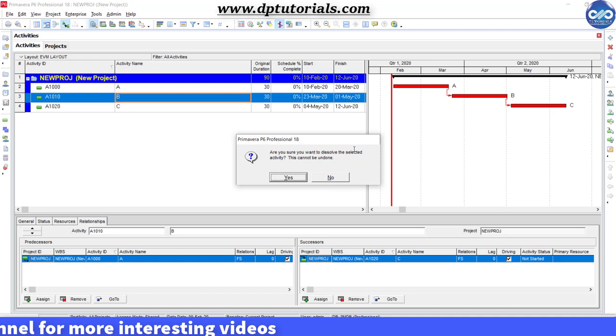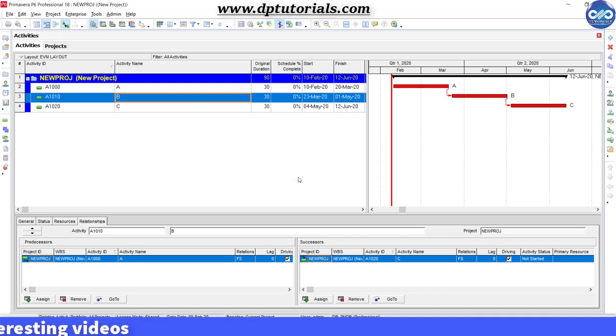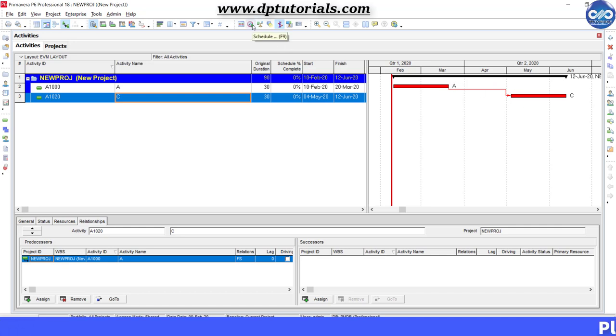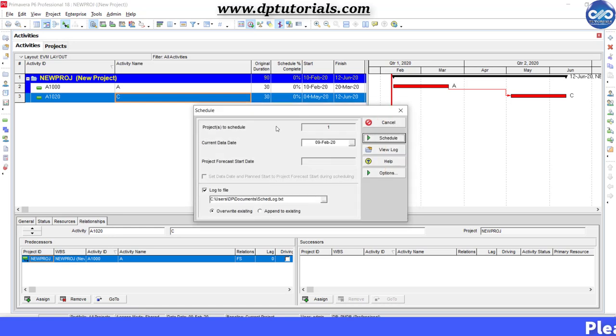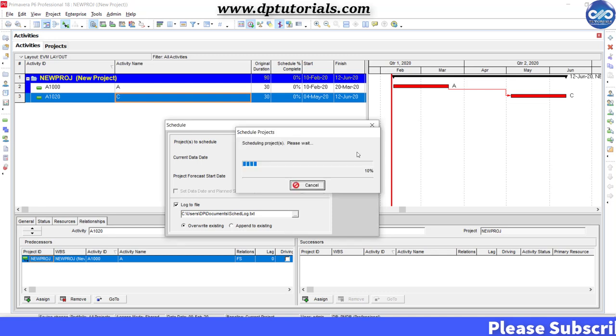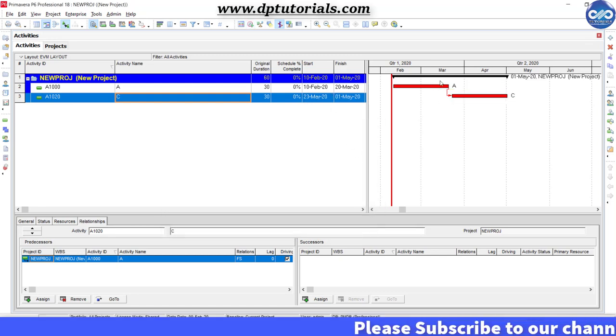Click yes to confirm and then schedule the project to see the revised start date of C as 23rd March which is just after the end date of activity A. That means our logic has been bridged properly without any gap.